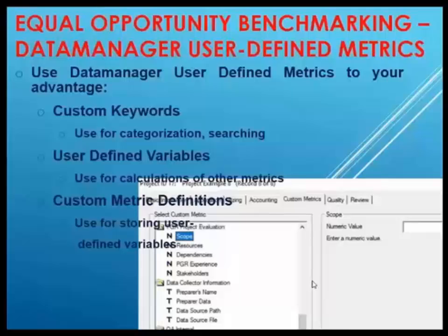And you can assign a numerical value to that. In this case, we've got -5 to +5, but you can use these values any way you want, and possibly do some deep dive analysis on things like, for example, for projects where scope was poorly defined, how was the productivity on those? So we can do that kind of analysis on that information once we have it.